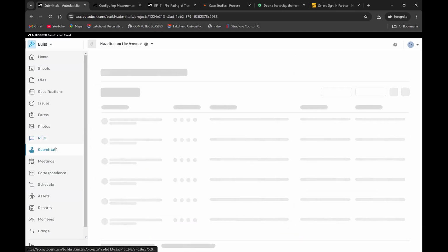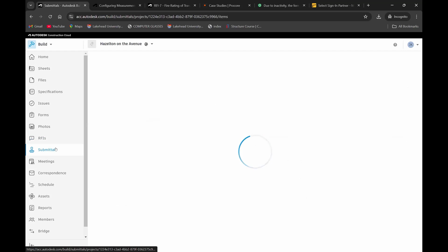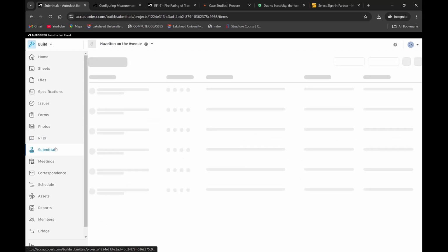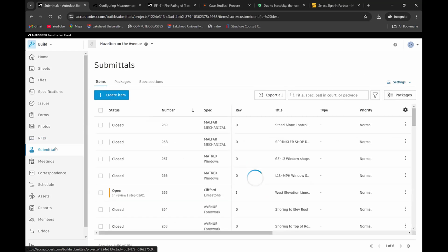Submittals is used for the drawings. There are so many drawings. Once we get a drawing, we need to send it to everyone, and everyone needs to check it and get it stamped. Once they approve and put their stamp, the engineers who have the authority to put the stamp will sign the sheets and send them back to the site team. Then the site team will start execution. Without any approvals, we can't do it, right? So this is where submittals can be used.